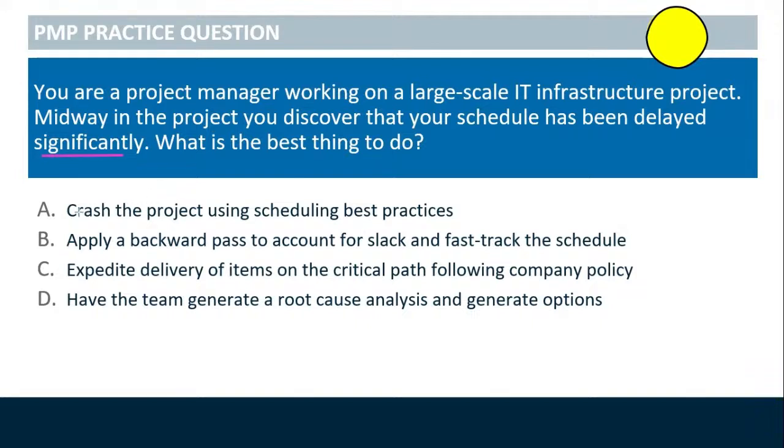So crash the project using scheduling best practices, though it sounds smart, is presumptuous because we don't know if adding resources to the project will actually make a difference. We don't understand the cause of the delay. It could be someone sitting on paperwork. It could be someone who is off sick. So we don't truly understand.